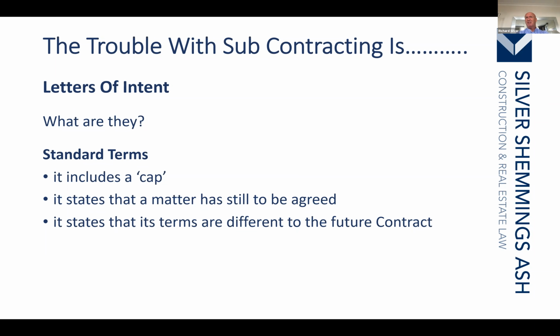Referring to retrospective effect again indicates that the contract is not initially in place. It then finally says that in the event that you or we do not enter into contract, you shall be entitled to be paid a reasonable amount, and you shall have no right for loss of profit, etc. By its nature, this identifies that you are not in contract.